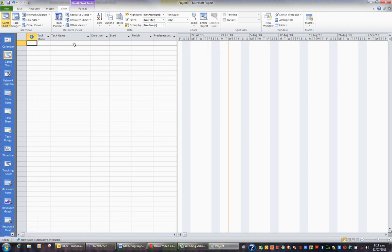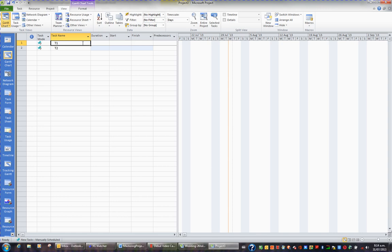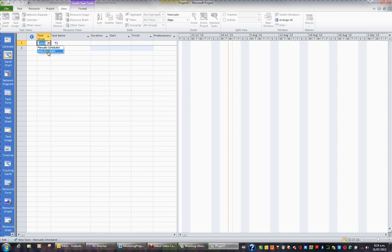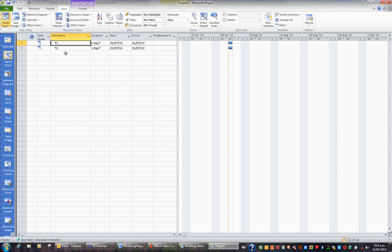So let's just chuck in here two dummy tasks: Task 1 and under that task 2. Now I can see also in the task mode column that these are manually scheduled. I'm going to go across to here and change these to auto-scheduled, so they automatically schedule themselves according to what I enter. So I've got two tasks, and they're both one day long because project put that in, and they're both happening on Wednesday.